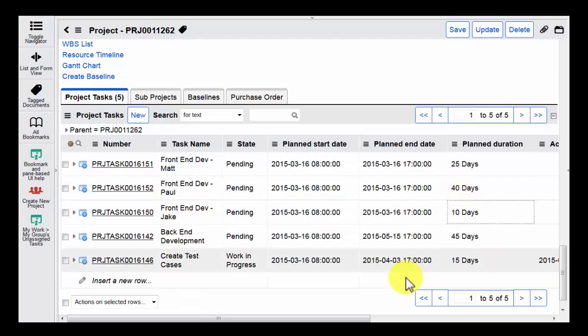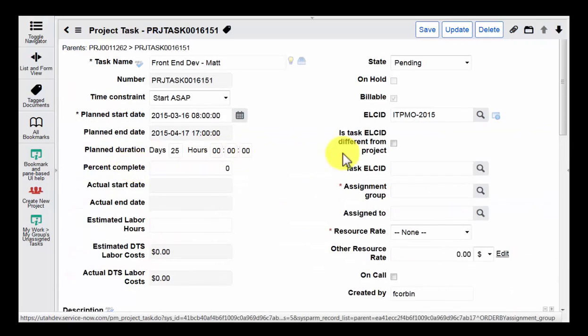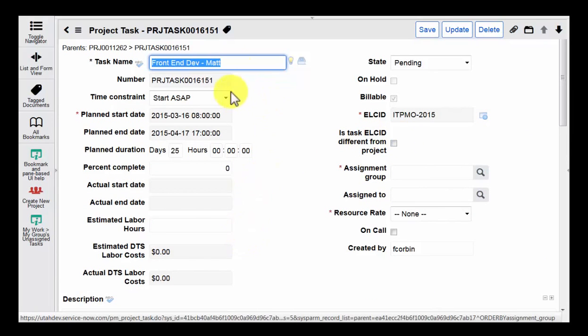So we've now created at least a rough idea. So this is great for planning, and then you don't necessarily have to fill out very detailed information, and you can have some tasks laid out. That's really great to also build your budget, because the estimated budget in the project form is all derived from the budget here that you have.